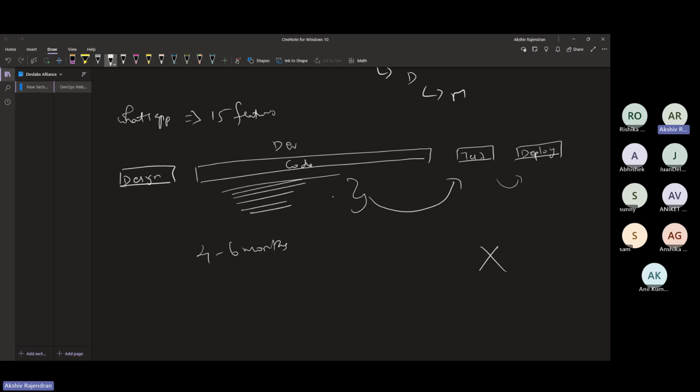After 6 months, they are moving this to my testing, and the testing team was doing testing for 2 months. There was an error. Now this will be moved back to the coding team. So this is going to be a keep on process. And I promised my client that within 1 year or 2 years, I'm going to complete the project. If my process is going to keep on rounding again and again and again, obviously that's going to delay my work.